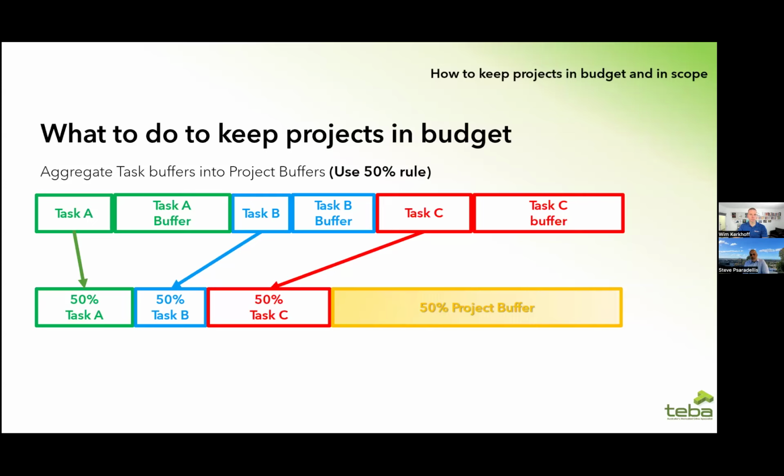That's okay, because if they go over, we've got all this project buffer that we can actually allocate. So if that person doing that job in a day and a half instead of 3 says, oh, I'm not finished yet, you go, that's fine. You can have another half day. Go for it. Or you can even have another day and a half. Go for it. So the extra time gets used when they run out of time, as opposed to allocating the whole time to them, and then they're going to use it anyway, because Parkinson's law will kick in.